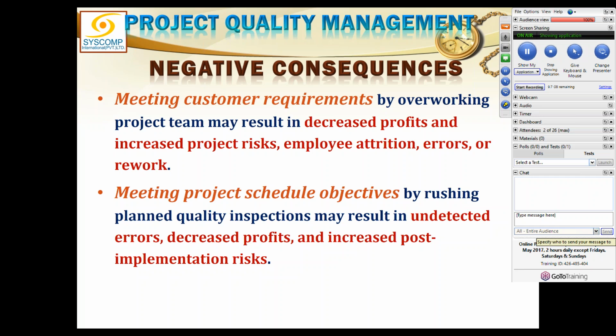And ultimately, it was printed on the cards, and that was a pathetic situation when the last check which was to be carried out before printing the cards, to clean the data, was also removed due to the speed, and ultimately a big damage was happening. They had to start another mini project to clean the data. That project of 3 months was done to clean the data, and for that new expenditure was done, and still there were problems. Anyways, this was a situation which will normally occur due to compression or undue compression of your schedule.